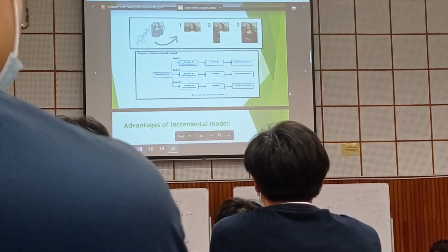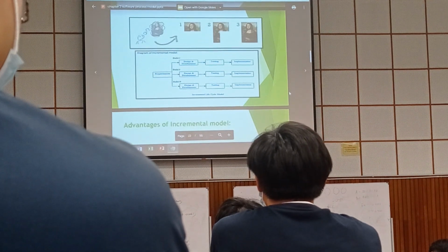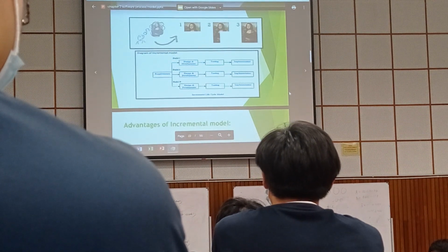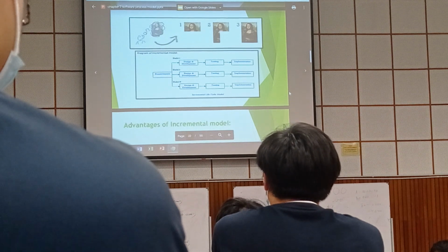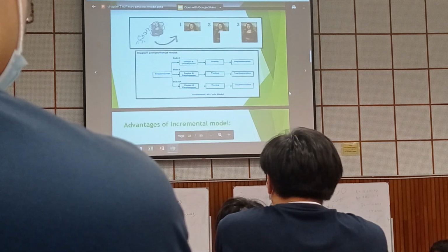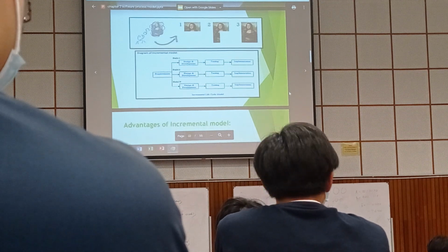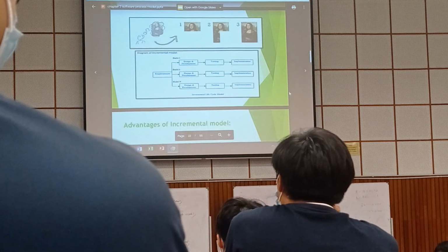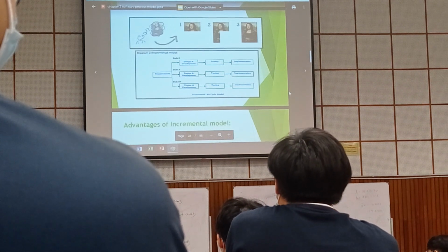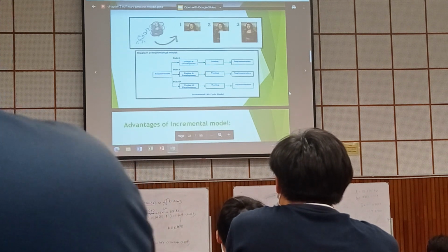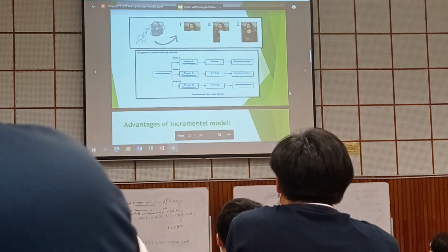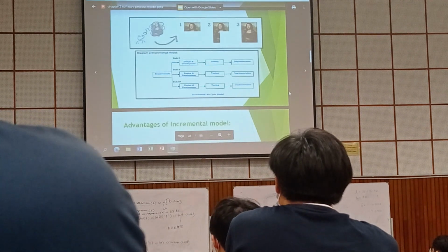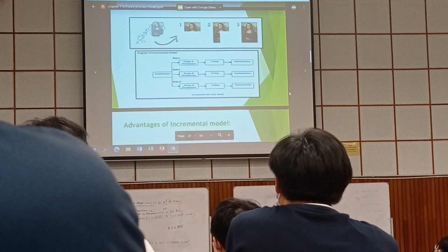But in your system you have many phases, many steps. For example, for the user interface, if you want to create the login part, you do it incrementally one by one. So it could be many loops. But if you look at the cycle here, for every loop, every increment, you need to start from the requirement, design, development, testing, implementation.